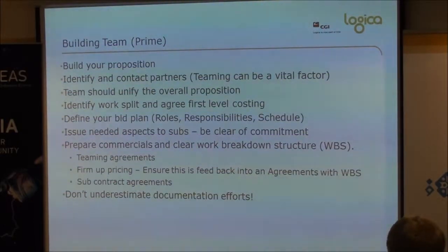You're going to need to prepare your commercial response so that you get all the financials correct. Yeah? So again, the WBS is key on that. The WBS, or work breakdown structure, is going to be the document which you're all working around. So you can understand what they're likely to be bringing, how much that piece of work is going to cost, so you can drive a final price.